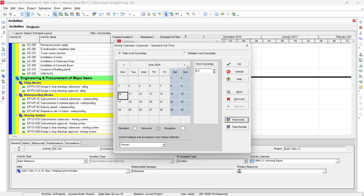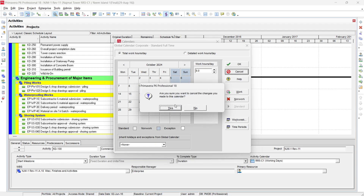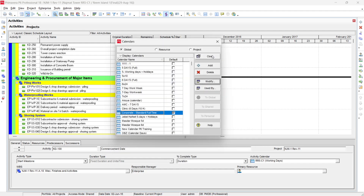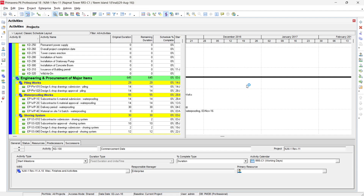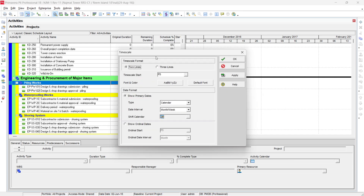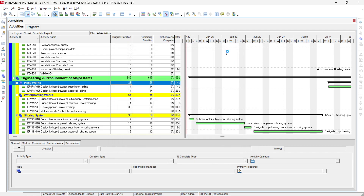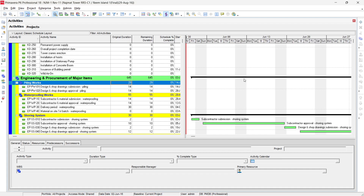Once you define your work week, you also need to define specific holidays. For example, if October 17 is a holiday, mark it as an exception and set it as a non-working day. After marking all your holidays, right-click in the Gantt chart area and go to Time Scale. In the Time Scale dialog, the date interval is currently set to month per week. Open the dropdown and select week per day, then click Apply. Now the Gantt chart shows Saturday and Sunday as holidays.